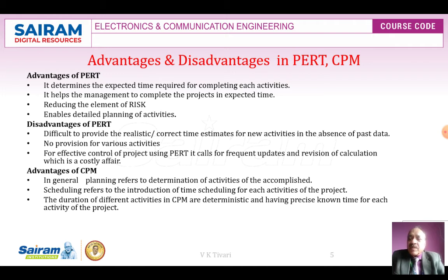Advantage of CPM. Planning refers to the determination of the activities to be accomplished. Scheduling refers to the introduction of time, scheduling each activity of the project. The durations of different activities in CPM are deterministic, with a precise known time for each activity of the project.